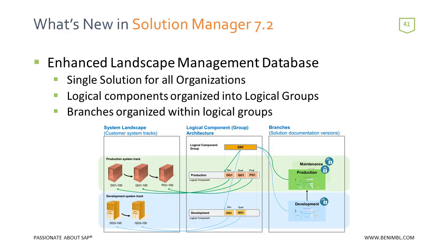You should really learn all this before you even upgrade, because an important part of the upgrade is the content activation and deciding your solution, what's going to be included in your solution, and how your logical components are going to be grouped together. That decision is made before you even upgrade. And that's a big part of what SAP has been pushing with all of their presentations. That's something that you do in 7.1 before you go to 7.2.